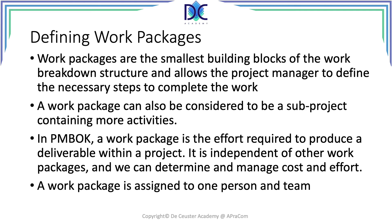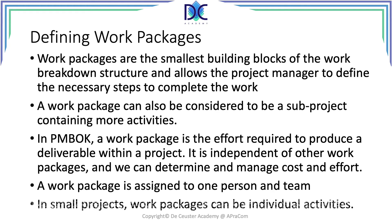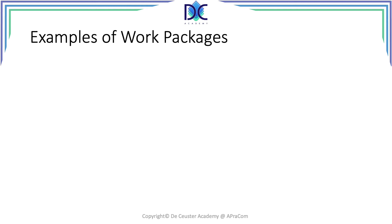A work package is typically assigned to one person or a specific team, such as painters in a company. In small projects, the activities and the work packages can basically be the same — work packages can be quite large. For example, painting a small house may be one activity, while in a large building it may be more complicated. Let's have a look at some examples of work packages.